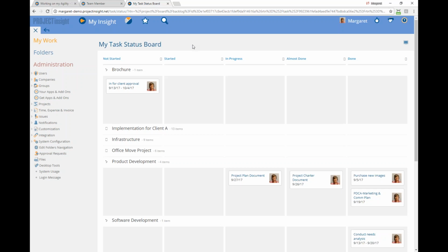Ooh, this is another really good question. Can statuses be specific to a project or a kind of project? And no, the work statuses are across all projects. Started, in progress, almost done: these are the native options. You can add more or you can add fewer, depending on the kind of detail you'd like people to present. I know teams that go from not started to done because their tasks move so quickly that they don't really have a need to do the in-between percentages.